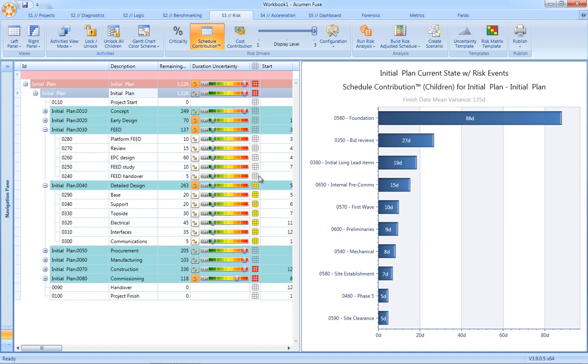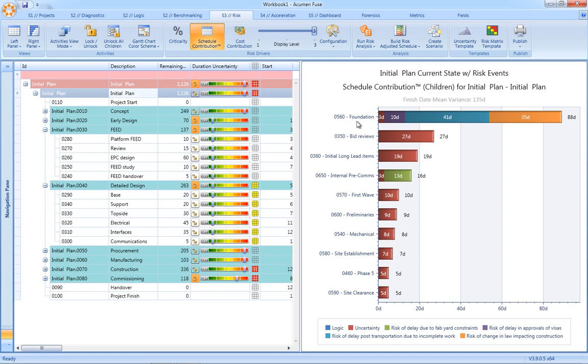The schedule contribution factor not only tells us which activities are most responsible for a risk exposure, but secondly, it details these drivers in true duration and cost terms.